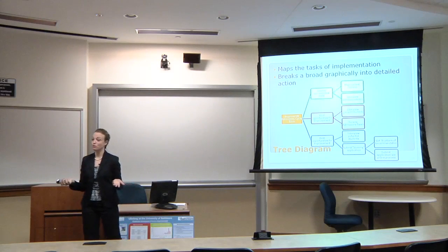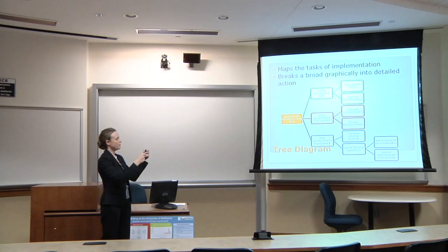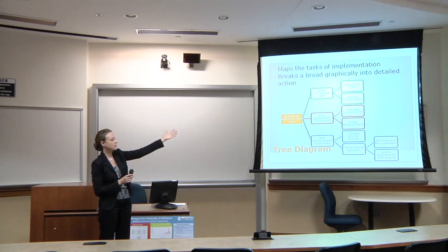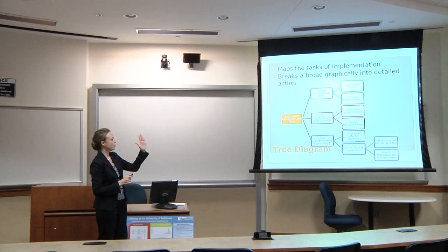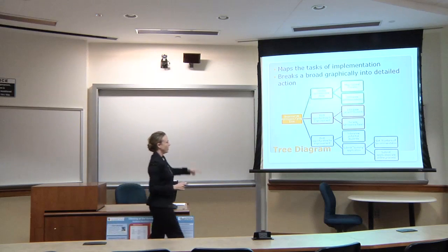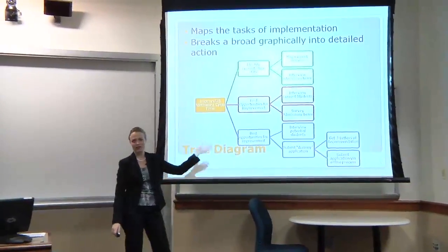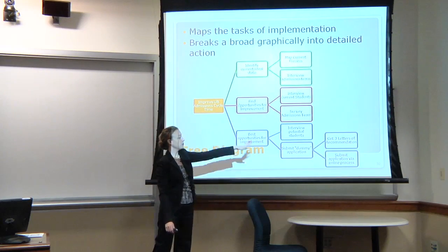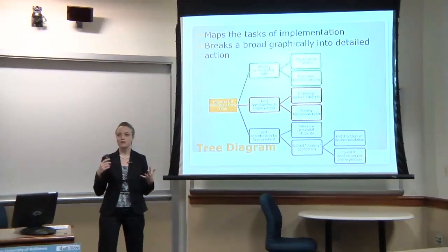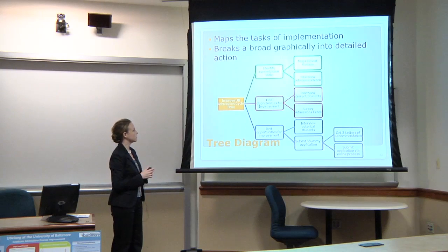Now here's another reason you can do the Post-it notes. You've got the tasks 1, 2, 3 organized. Now you can move them into something where things are dependent. As part of submitting this dummy application, we need to get some letters of recommendation, and we need to submit the application via the online process. It helps you order them. You can do these in PowerPoint, which is really nice. But I had to change the colors because the way they had their color set up was totally confusing. So I did green for task 1, red for task 2, blue for task 3. That visually helps me keep in line what was together. You can do it any way you want, but that was just my suggestion. I found it made it a little easier for me.